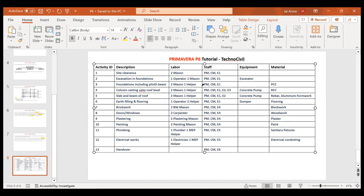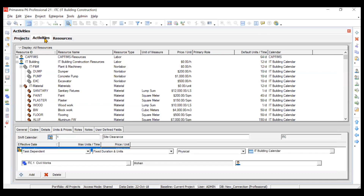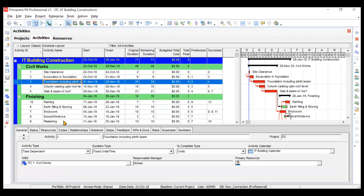Activity number three requires one planning manager, one construction manager, engineer number one, two masons, one helper, and PCC material — assigned to foundations including plinth beam. We will go to the activities tab and go to activity number three, then click on the resources tab. You should also add the budgeted total cost column in your main activity window so you can see the total cost contributed by resources.